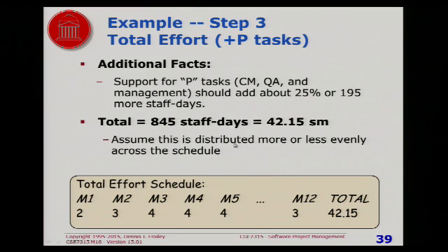So basically, we had 3 people. Let's say that brings us up to an average of 4 people, or maybe slightly less. But anyway, so what's called our total effort schedule has basically 1 more person per month on the average, so that we get the higher total staff months. And that 1 extra person is doing all the support functions.